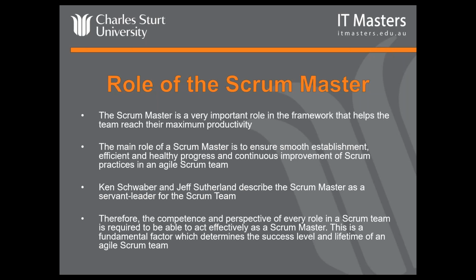I've got another question that I'll jump in and answer. We've been asked, does the Scrum Master role make the traditional PM role redundant? It depends. I should mention that it's a bit of a running joke when you teach Agile courses, because the trainer will often say to you, when you ask a question, well, it depends. On a single project, small one-team project, there is no project manager. But if you were scaling Scrum for a large project, some organisations might have the concept of a project manager, but Scrum itself has the concept of a Scrum of Scrums and a Chief Scrum Master. So it really does replace the PM role, so to speak.